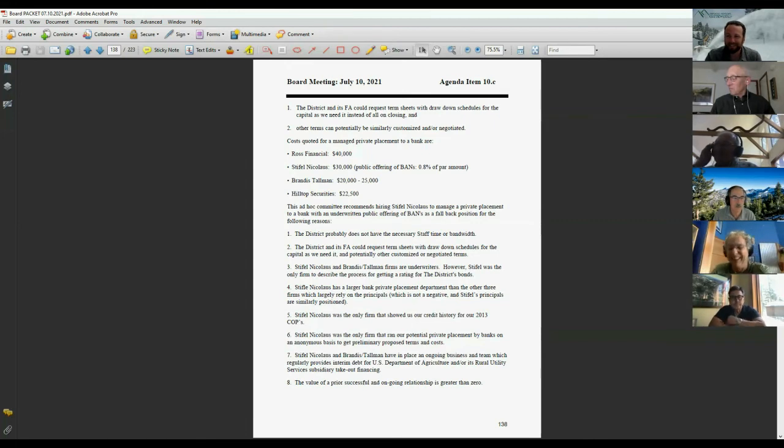I don't think we'd be building a tank in winter. But if you saw from the schedule, and I took it down already, the demolition occurs first and then the tank follows. If we get an early thaw like we did this year, we would have the demolition go ahead, and then the tank would follow immediately. But tank contractors are very, very busy right now. I don't know if anyone saw the one in Lemoore that blew up, literally blew up a water tank. So they're very, very busy right now. Thank you. Are there any other questions on this?